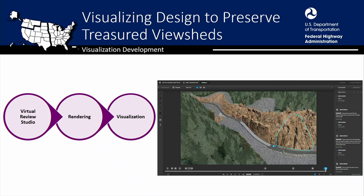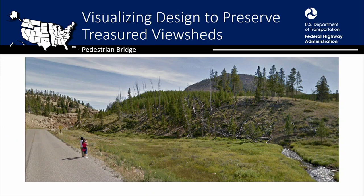And then we took it from there to the next step of rendering. That can be a really time-intensive process, so we wanted to make sure that we had the virtual review studio first so that we're not rendering it repeated times, that we're just getting that smooth visualization once or twice, really finalizing it, and making sure that we get the video that we can post and share and people can access via a link for those conversations that we wanted to have with the entire group. And then that brings us to the visualization itself, which you got to see, and then it was shared with all of the stakeholders and the team through that method.